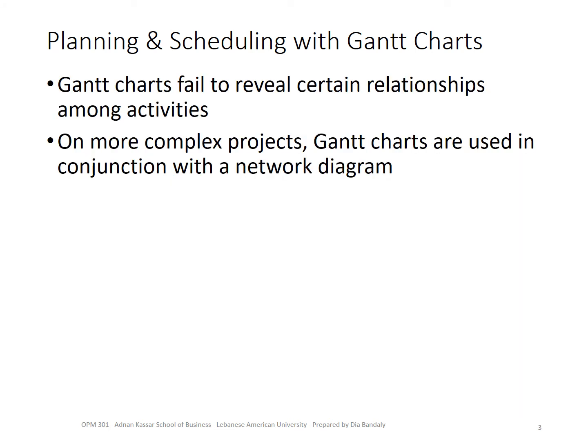So I hope that you liked how we developed the Gantt charts. As I told you, it's a very important tool, guys. You should be happy that you learned that here. And unfortunately, Gantt charts fail to reveal some relationships. I'm not going to go into details here. Really, it's not the time, because this is only one chapter in this course. But what you should know is that it has some limitations, and that's why Gantt charts are used in conjunction with other tools where we use network diagrams. And in a network diagram, all the relationships are revealed very clearly, and this is what we're going to learn next.